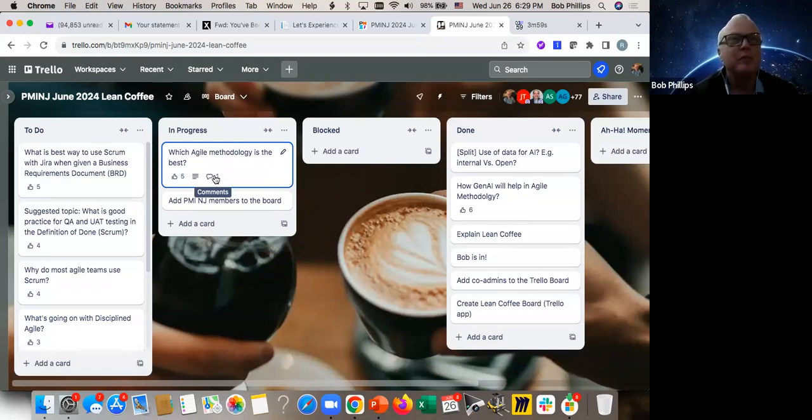Where Kanban is more set on a pulling type of system, instead of pushing work on people, they pull it, and it visualizes the team's workflow, where basically you can work with the team and come up with columns that make sense as far as how the team works. Like, how does a team work? They write the software, they do it locally, then they put it into the dev environment, then they move it into a pre-QA type of environment, and you can track all those steps in columns, and then the team would be able to manage their flow.